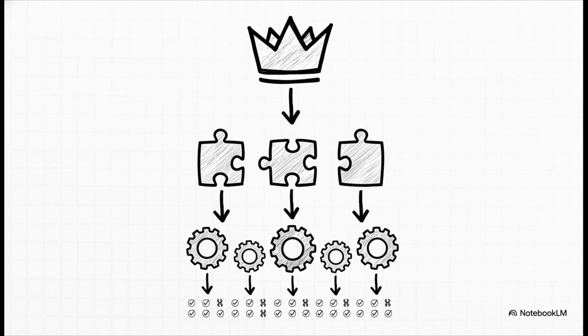These atomic units stack up into a really clear hierarchy. You've got epics at the very top for your largest grand-scale scenarios. Those break down into features. Features then group together your requirements or user stories, and then those break down even further into actionable tasks.